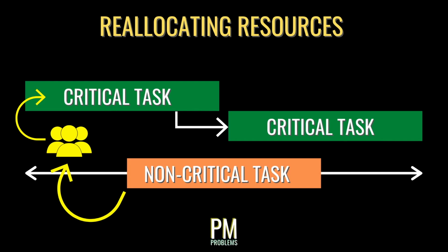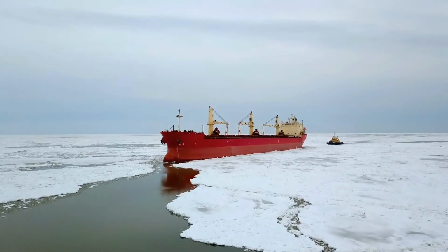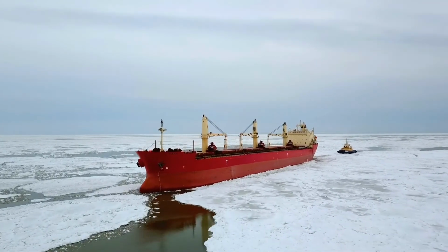This option is essentially the same as technique number 1, adding resources, but the advantage of reallocation is that you aren't technically adding resources, which means at the moment your project isn't taking on additional costs. For example, the captain of a ship will call for all hands on deck when an urgent situation arises.